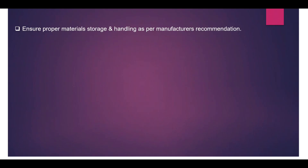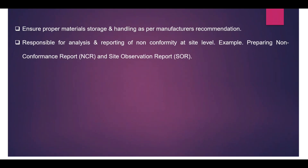Ensure proper material storage and handling as per manufacturer recommendations. When materials are received on site, coordinate with your site team for proper storage to avoid non-conformance. You are also responsible for analysis and reporting of non-conformity at site level — for example, preparing an NCR (Non-Conformance Report) or Site Observation Report. If an activity deviates from contract documents or local codes and standards, you raise the NCR or SOR based on the severity of the activity.